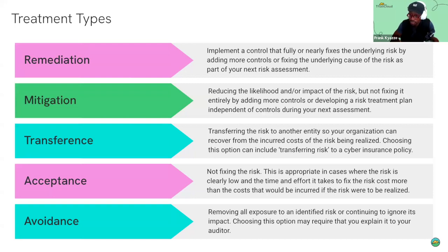But the idea of being able to track the work that's supposed to be done, that's going to be done, and will be done on a timeline, and then having KPIs to track and say, okay, this many risks are past due, this many mitigation plans and activities are past due. We need to raise this as an issue to leadership. Taking that sort of tactical approach is what I've seen work best for organizations when it comes to remediation and mitigation.